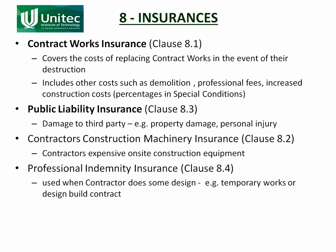The last type of insurance is Clause 8.4, and this only applies when the contractor is required to do some design as part of the contract. That's called professional indemnity insurance. Professional indemnity insurance is normally held by consultants and covers the costs if something goes wrong because of an error in design. If the contractor does some design, then he needs to have professional indemnity insurance as well, according to Clause 8.4.